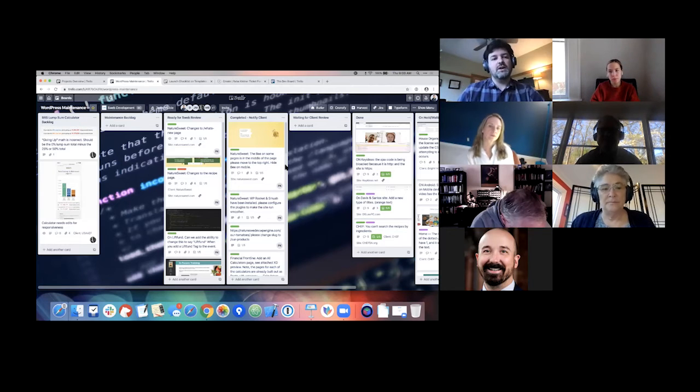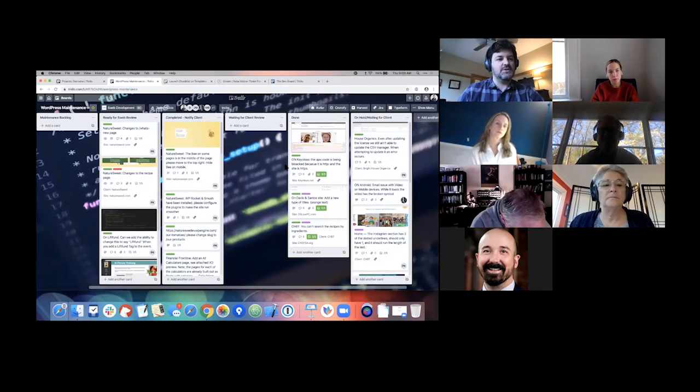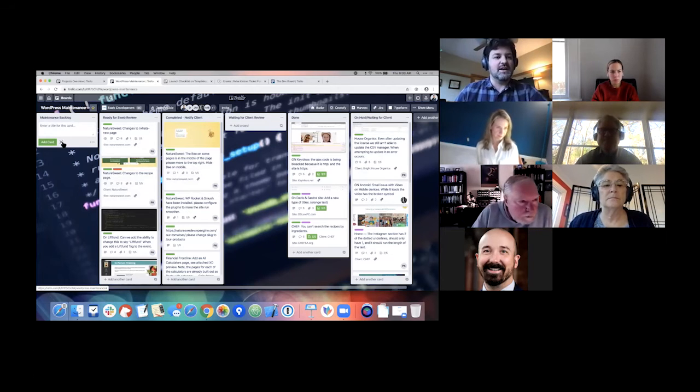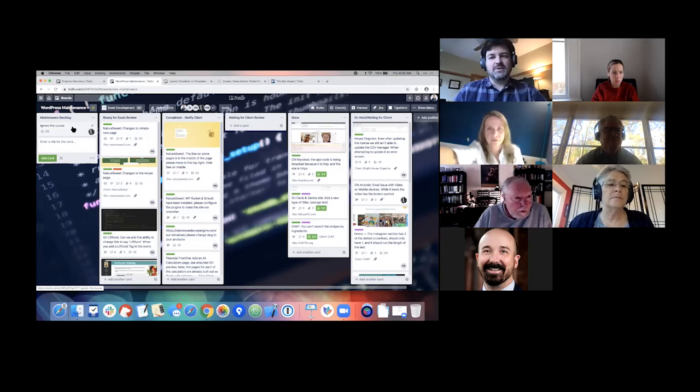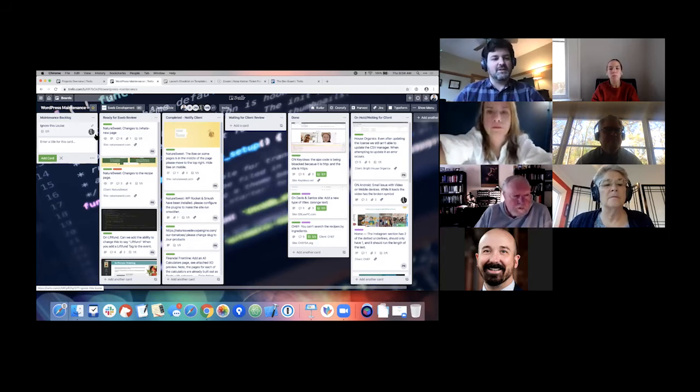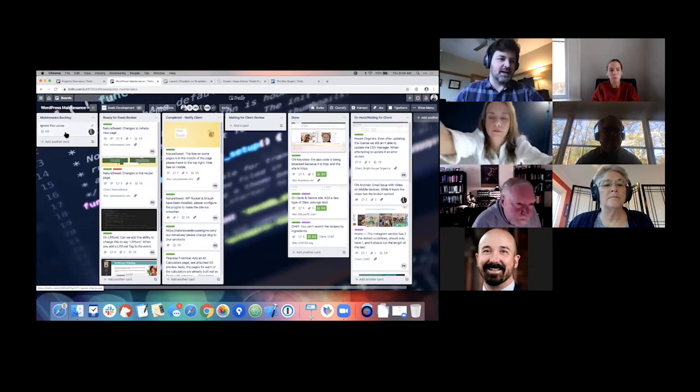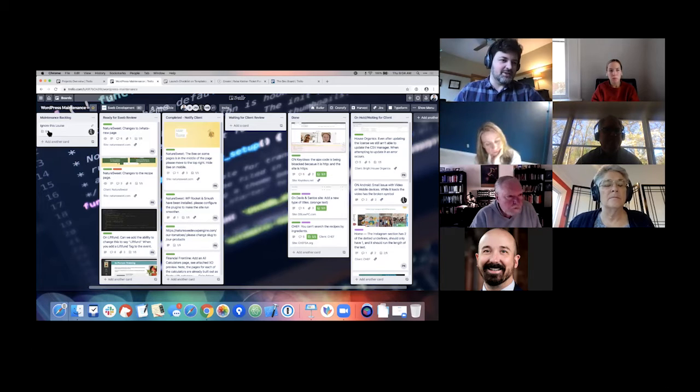And so here we have, again, our Kanban approach, right? The list on the left is a sort of different story, but we start here with our maintenance backlog, and it's what I love to see. The backlog is empty right now, so that's great. But as we get new requests, we'd add a request here. I'm going to add this card, and I'm going to tell my technical lead Lois to ignore it. But when I add it, you'll see why I tell her to ignore it. The rules I have in place are going to automatically assign Lois to that card because I added it to maintenance backlog. And you'll see that it also added this little checklist here.